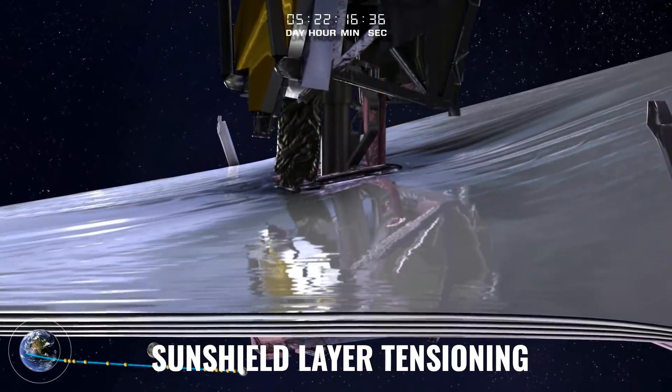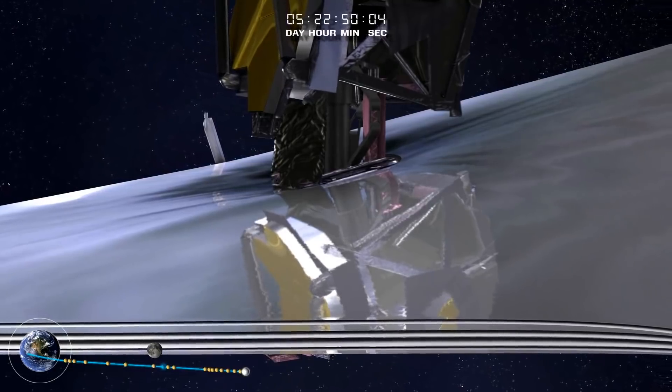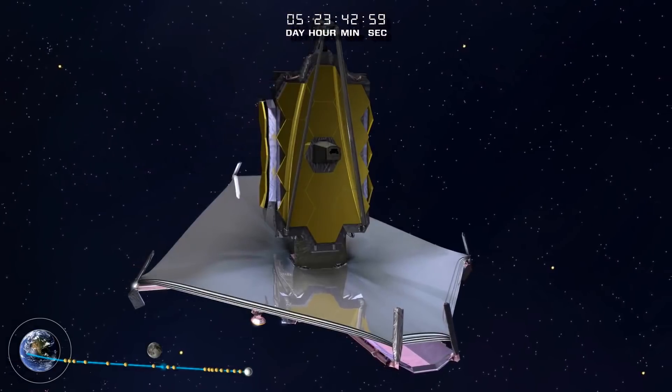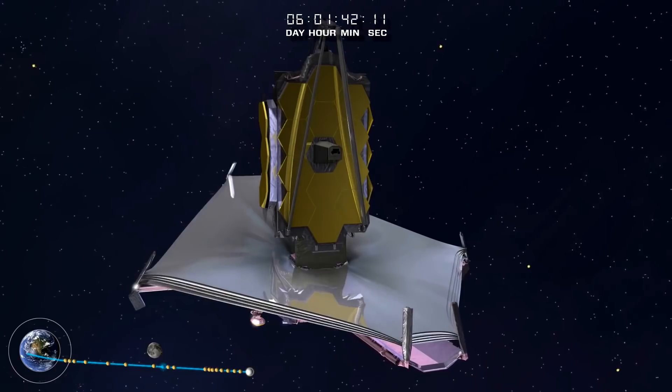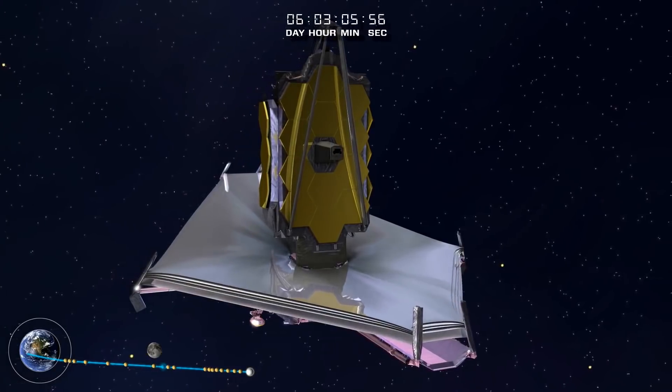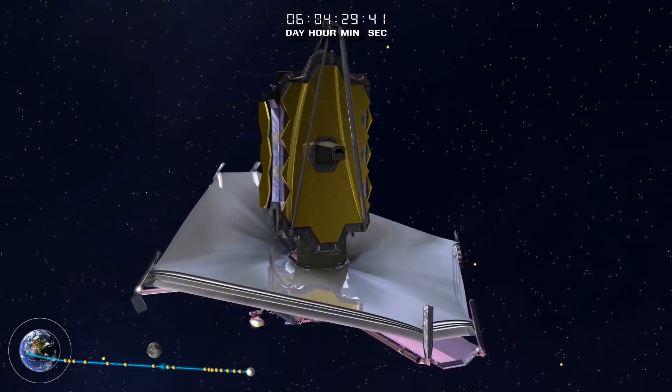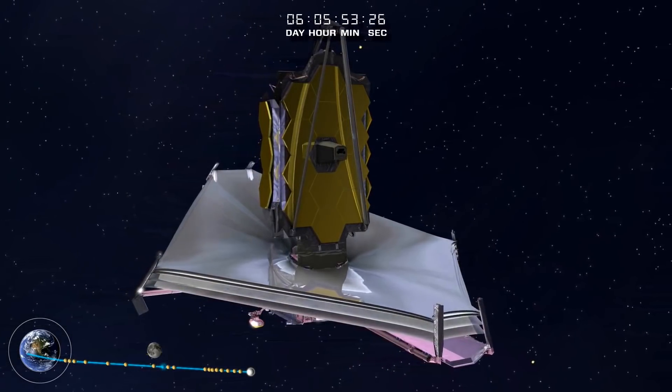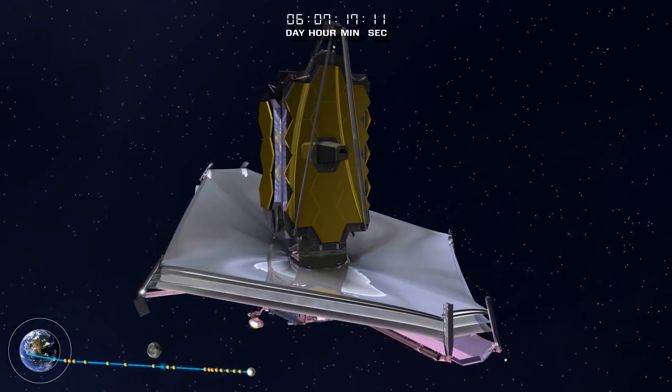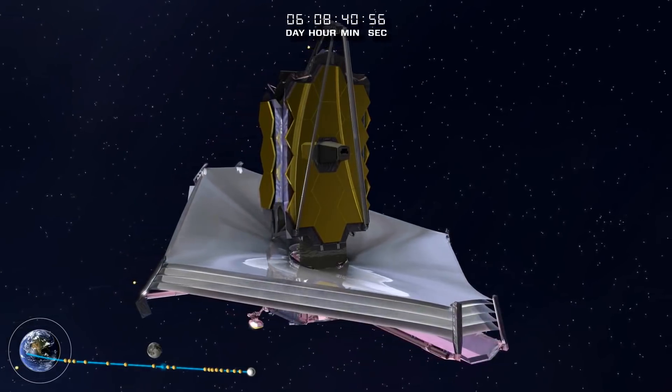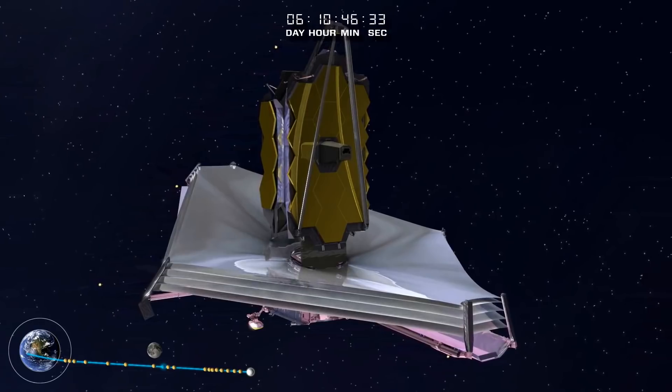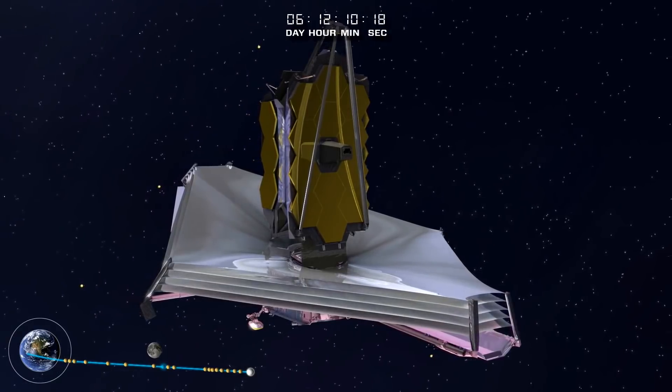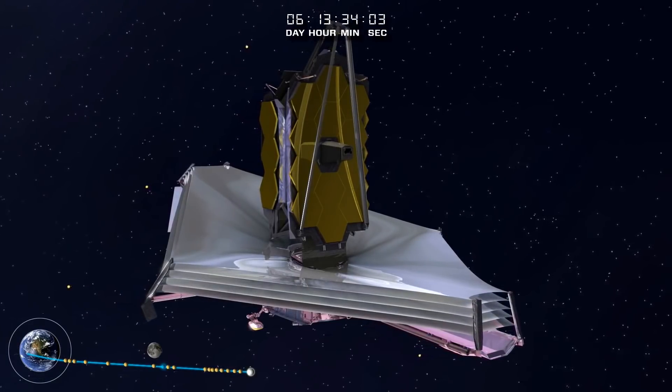Sunshield layer tensioning ongoing. This operation is a multi-step, two-day activity, which completes the final membrane releases as well as tensioning the five layers of the sunshield. After initial sunshield deployments of the forward and aft UPS, which carry the fully folded sunshield, followed by the port and starboard mid-booms, which support and initially unfold all five layers of the sunshield together, each layer is successively tensioned.